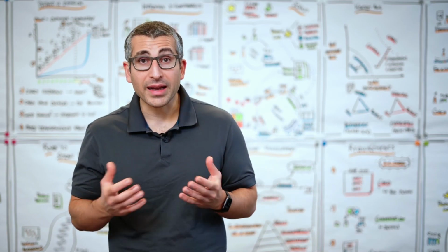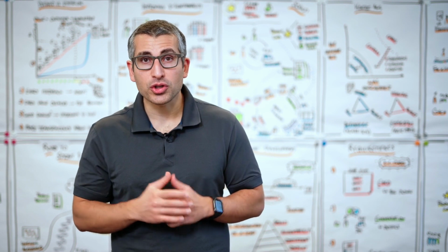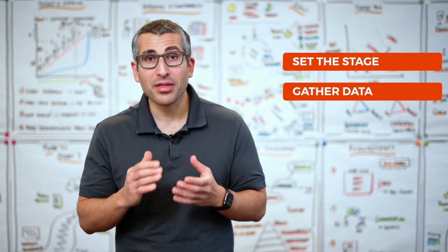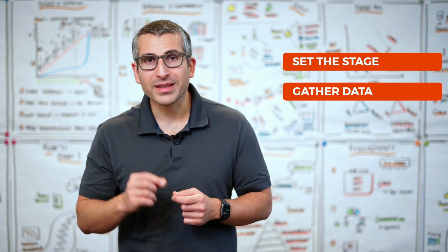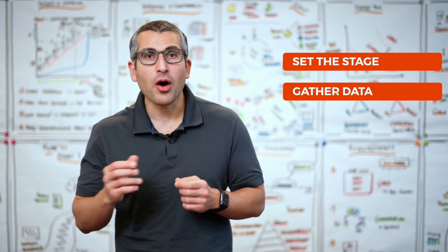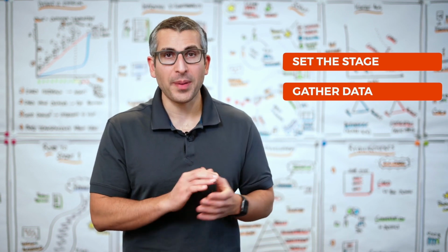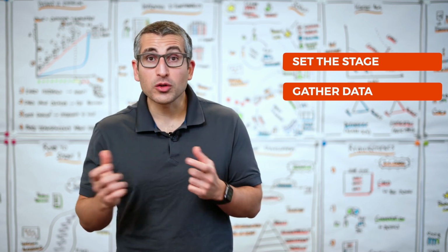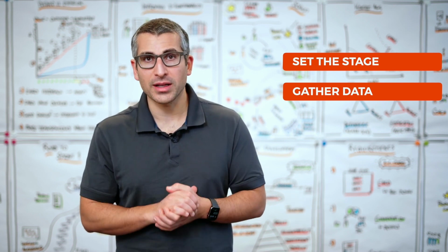One approach that I like a lot is a 5-step approach towards running an effective retrospective. Step number 1, setting the stage, which basically means you make sure that everyone knows what we are going to talk about in the next 45 minutes, 60 minutes. Step number 2, gather data. This is all about getting different perspectives on how things worked out during the past sprint. How did we collaborate? How did our tools work? How did we create requirements? And so on and so forth.